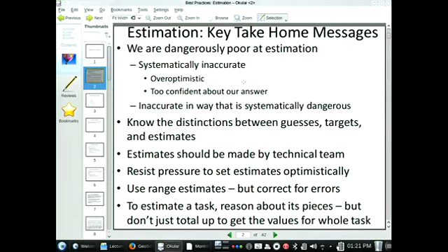be addressed. Now, the final point here is something that is sort of a point of wisdom in terms of a best practice that's built up within the software industry, and it relates to something Connor mentioned earlier, which is when we're trying to estimate things, and we have multiple estimates, perhaps from different people, perhaps for different sub-pieces of this thing. Often we'll get errors in those estimates that cancel once we aggregate them up. Sometimes the error is on one side or the other, and they'll cancel out.